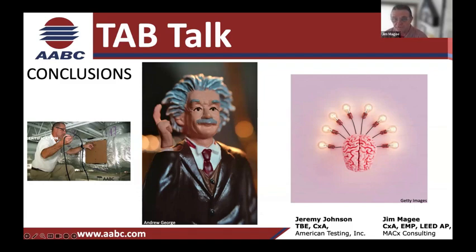But typically, as far as the test and balance is concerned, they're obligated not to my monitoring them while they're performing their services. They're obligated to the verification of their tabulated results at the end, based on the commissioning or based on the design engineer's approval. And it's usually the designer that you're going to demonstrate for. Sometimes he delegates that to the commissioning provider, but